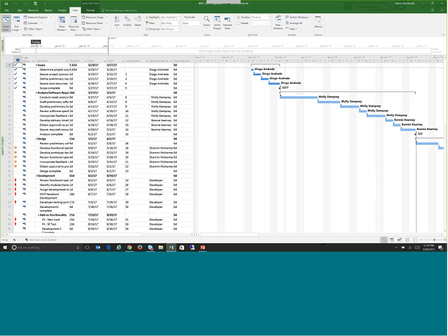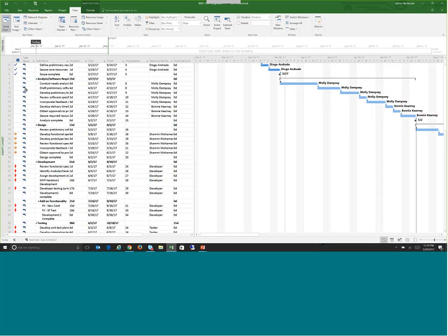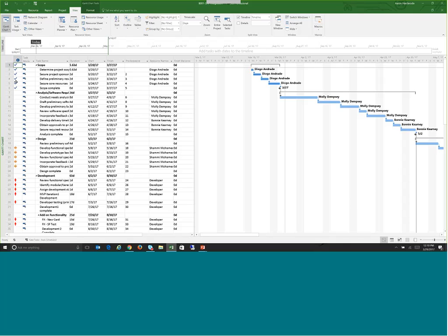I've got a work breakdown structure already defined. I even have progress on some of the tasks in my schedule. Some of them are complete. Okay. And again, imagine the scenario here is there has been an approved scope change. We're going to deliver something that was not originally part of the schedule, but we're now going to incorporate it into the schedule. And we don't want to just reset everything and measure against just those new deliverables and new requirements. We want to measure against the original and also the newly included scope changes or new deliverables that we're trying to achieve here.